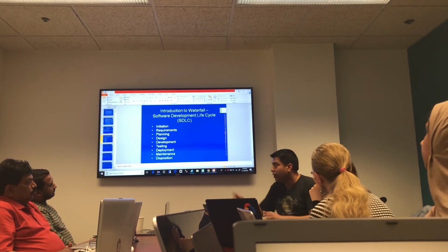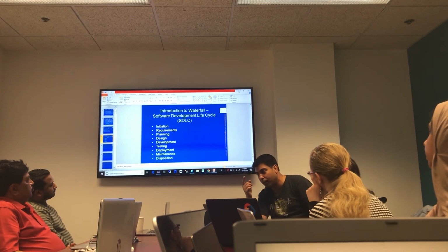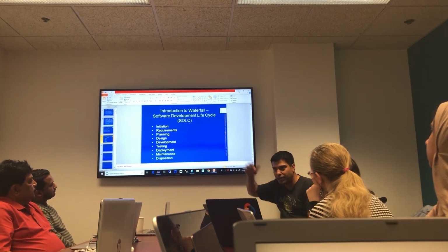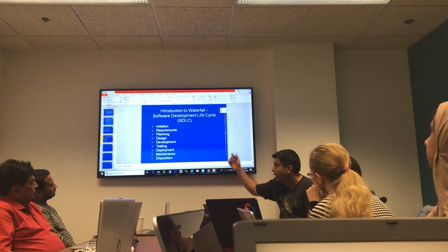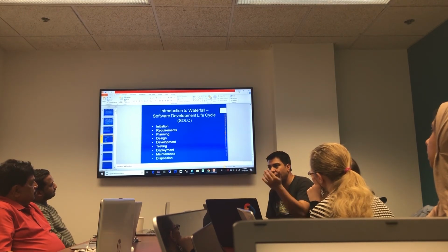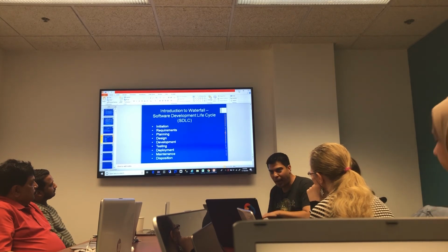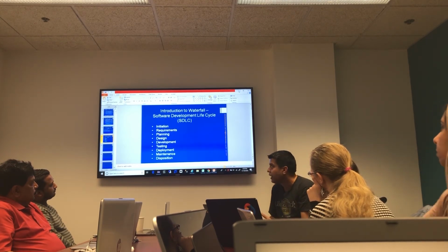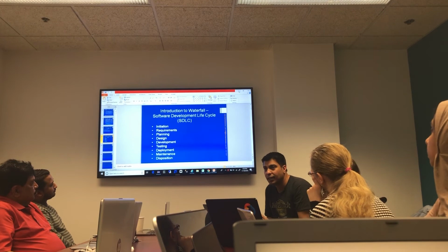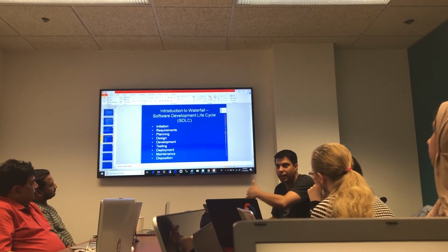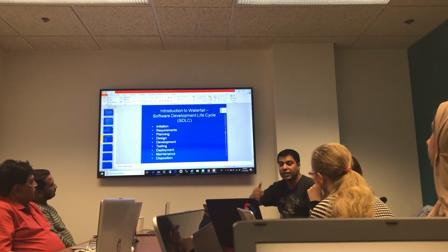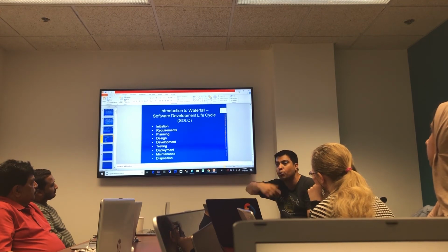Very little impact if you are reviewing requirements, final, and the client says I missed something. If you're in the planning phase and the client says, again, less impact, but more than the requirements phase. If you're in design phase, again, the impact is not that bad, but it is more than what it would have been in requirements. If you're in development phase, it's a lot more impact. If you're in testing phase, it's a lot more. If you're in deployment, which we haven't talked about, it is more expensive.